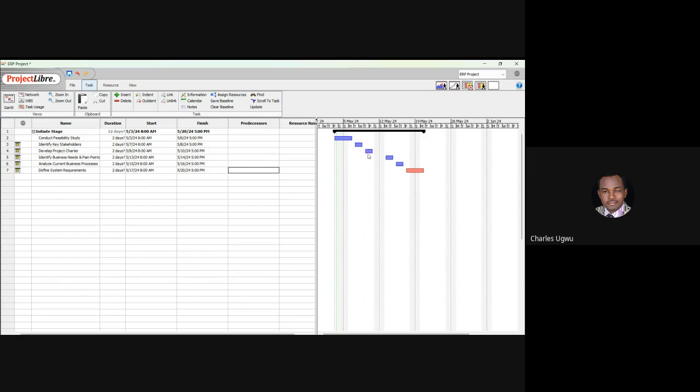It means that this one can start their work without waiting for this particular person, because they are not dependent on each other. That's why they are in blue color. So there is no critical path here, because they are not depending on any of them.